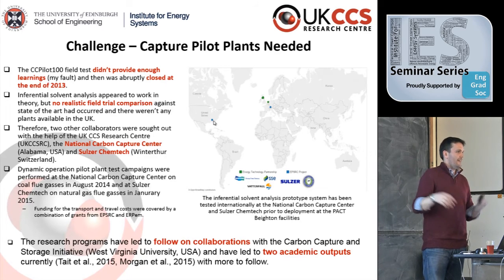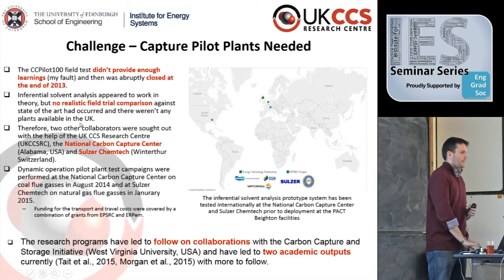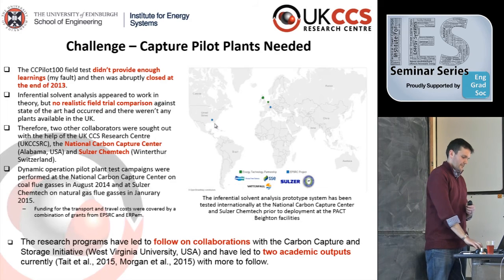I had kind of learned that you don't know how long you're going to have, so you prioritize getting what you need and getting out. So that actually didn't trip me up the second time, only the first time. But these kinds of things happen in the real world. Anything that is a real world trial, your priority of doing great science is way below their priority of turning the plant on and off. You should just know that.